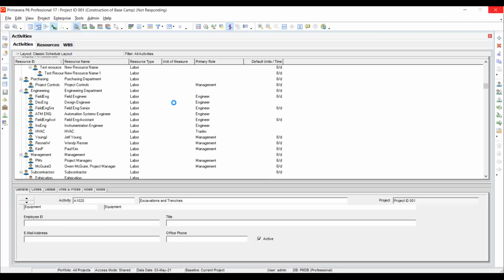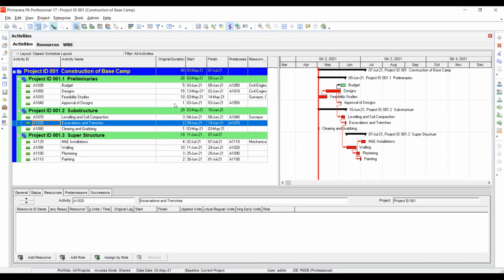Now you have the laborers, the company staff, or you can be an engineer, a site engineer. Okay, I understand that one. Yeah, and also what you should avoid is putting people's names into the software, because someone may leave. It is always better to just use the positions, like site engineer. The titles. Yeah, just use the titles.